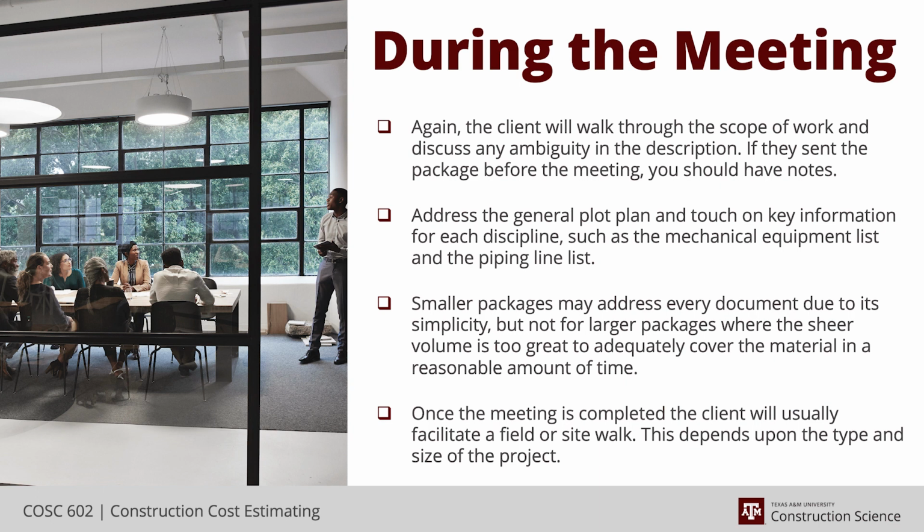Those larger jobs, like I mentioned, jumping back to the hundreds of millions plus, usually when they're that large, you're going and just clearing out a whole open area. You've got an open field of some kind. Even though we still like to have boots on the ground so that you can do an assessment of what the soil is like, what the access to the site is like, where we're going to put the laydown yard, where our office is going to be, where we're going to have employees park, things of that nature.